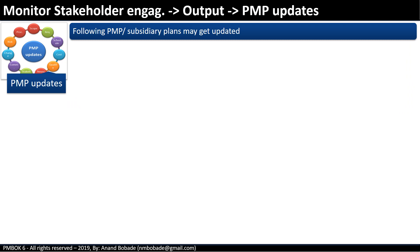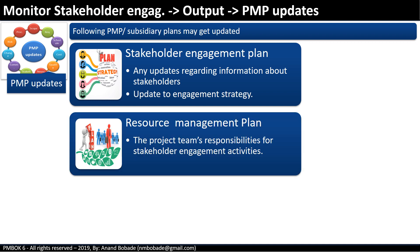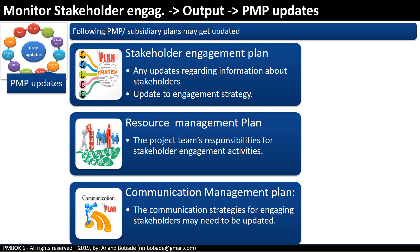The primary component of the overall project management plan update will be the stakeholder engagement plan, where updates regarding stakeholder information are added. The project team's responsibilities for stakeholder engagement activities may need to be updated in the resource management plan. The communication strategies for engaging with stakeholders may need to be updated in the communication management plan.